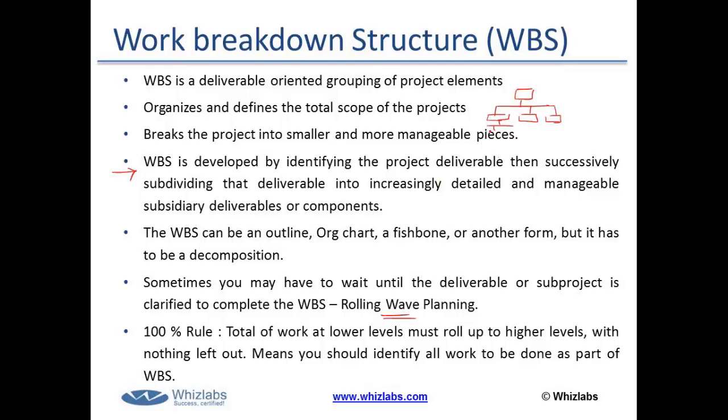Tina has a question. How can you wait to complete the WBS till half of the project estimation, and many things are dependent on the WBS for the scope? Tina, there are a lot of things involved here. If you are working on a large project, you do not do a cost estimation up to the minute level. You rather go for a ballpark estimation. Maybe you can use an analogous estimation technique to look into the historical data or previously undertaken similar projects to do the estimation as a whole and create the WBS only for half of the project.